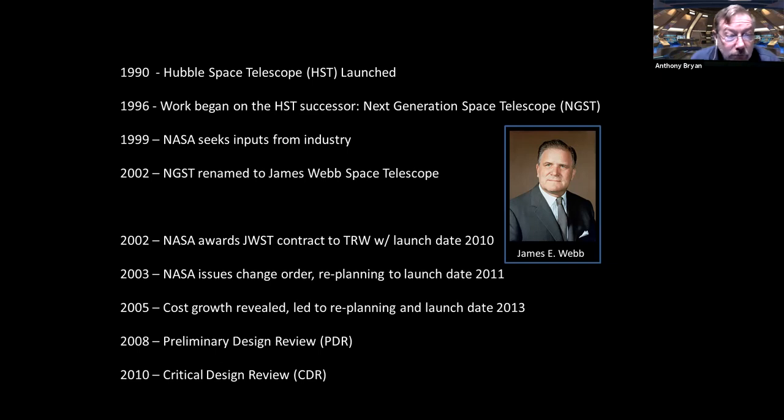So here's our little timeline for the project. A little background. In 1990, the Hubble Space Telescope launched. That's the predecessor, if you will, to this telescope. Okay. So in 1996, development actually began for a launch that was initially planned in 2007 with a $500 million budget. In mid-1996,